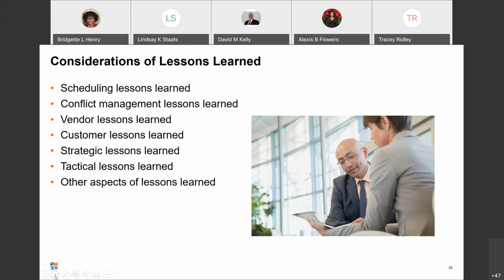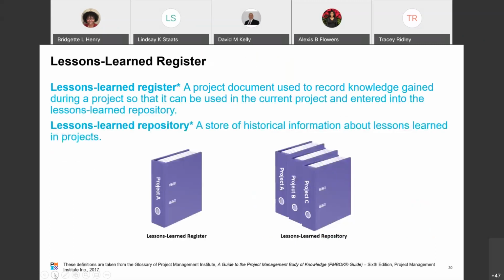Again, just a prime example, maybe during this time we've learned that our normal schedule of doing something like maybe putting our orders in 30 days early, maybe right now it's best to put your orders in 45 days early, something like that. It can be anything like that.